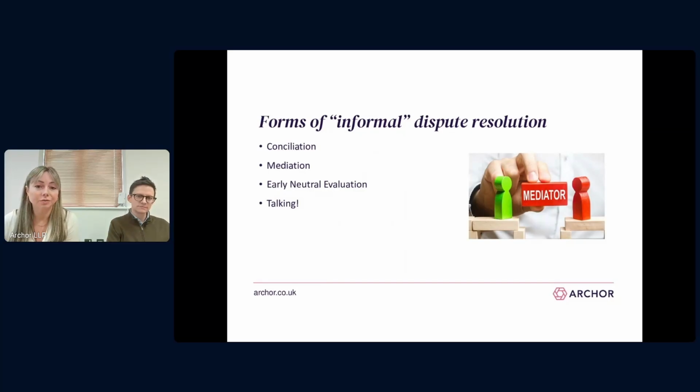Now, this is slightly different to mediation, which is the next one on the slide. That's a facilitative process where an impartial mediator helps the parties in dispute to communicate and to understand each other's perspectives and explore options for resolution. The mediator, again, won't come to a decision or judgment, and also won't express a view as to the merits of either party's case. He's just there to try and resolve the dispute.